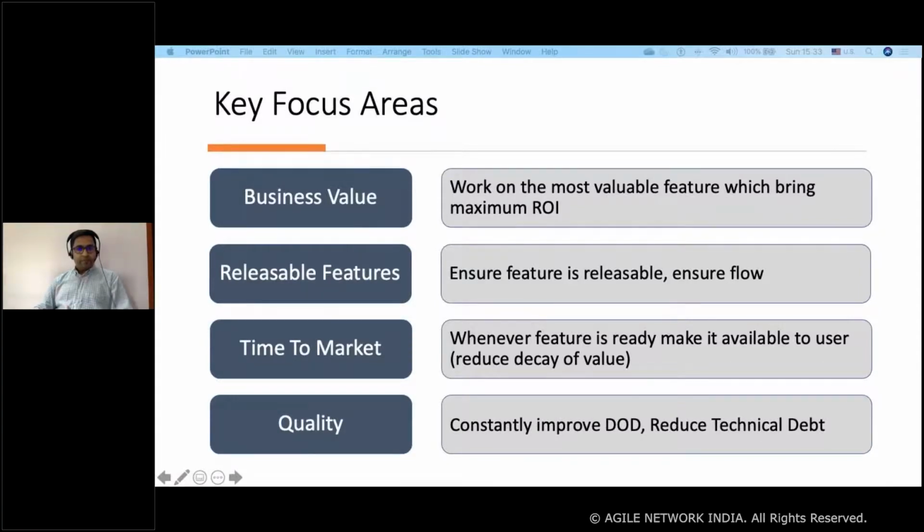So there should be visibility of the feature. We discussed the visibility of the feature level release plan. At any point in time, teams should be working on the features with the highest business value. Then maintain a feature elaboration plan, maintain multiple iteration goals, so the team is aware of the goal they are working towards.